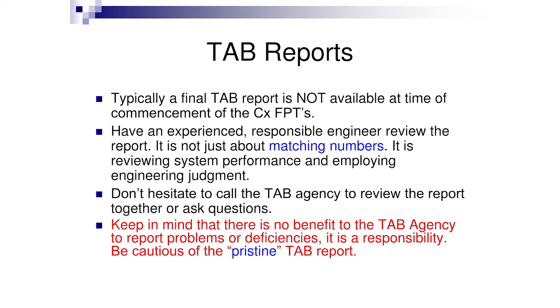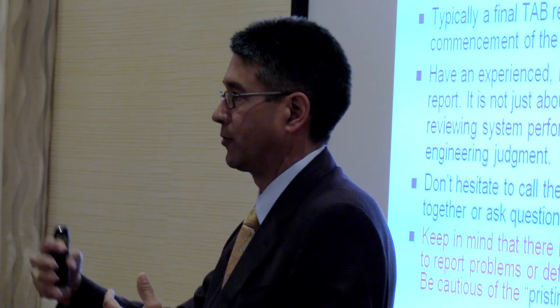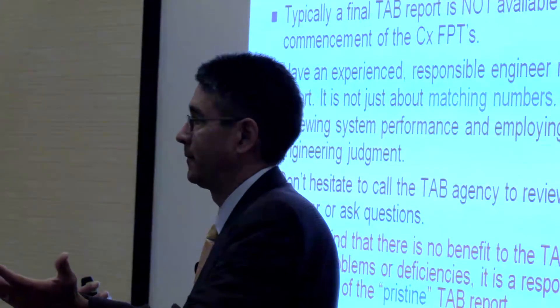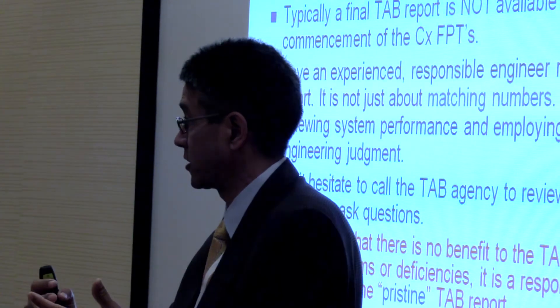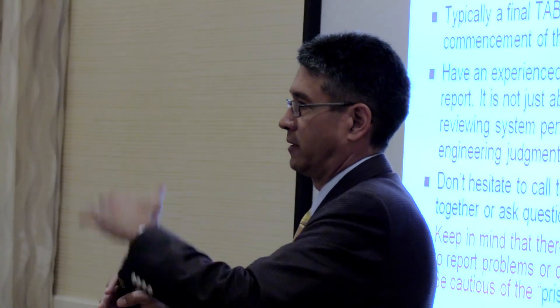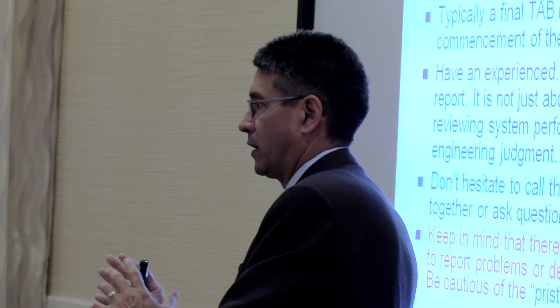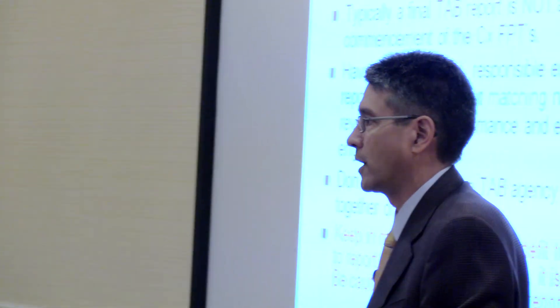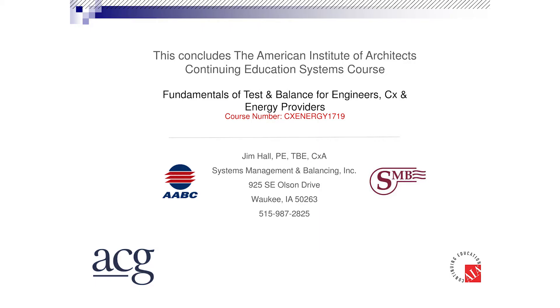TAB reports — probably the biggest thing I can say is: it doesn't benefit a TAB agency or commissioning company to publish problems and talk about issues they had on the job. But it benefits the owner and the design professional so they can evaluate the system. That pristine report where all the numbers look great — that's the one you've got to step back and say: hold on, especially if you had a large project. You're going to have issues and challenges. Welcome the reports that have challenges listed in them. Don't immediately reject them — start looking at it and saying why, how, does it make sense, can I live with it. Take your time going through a report.